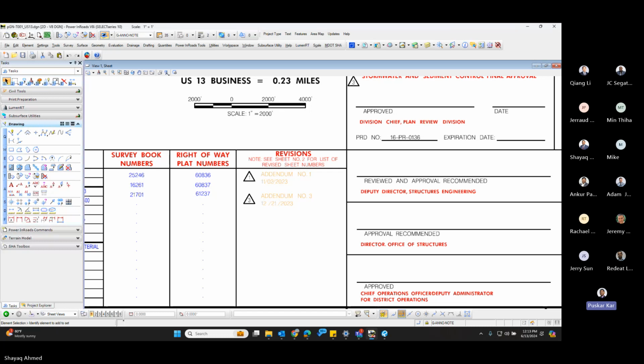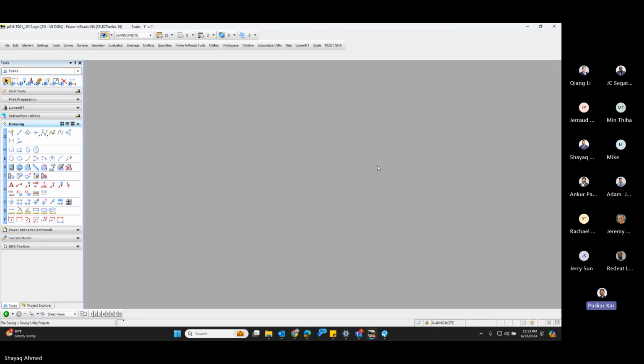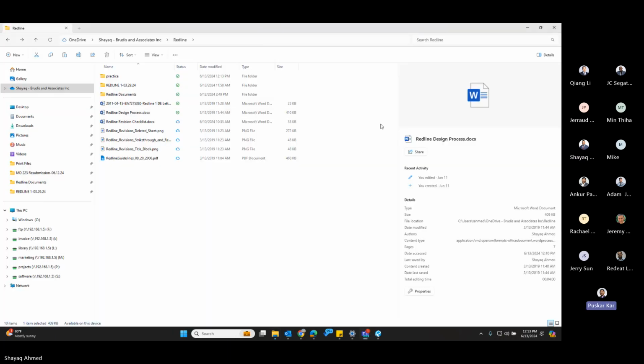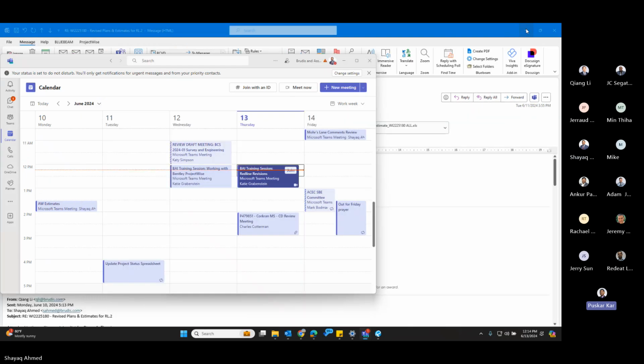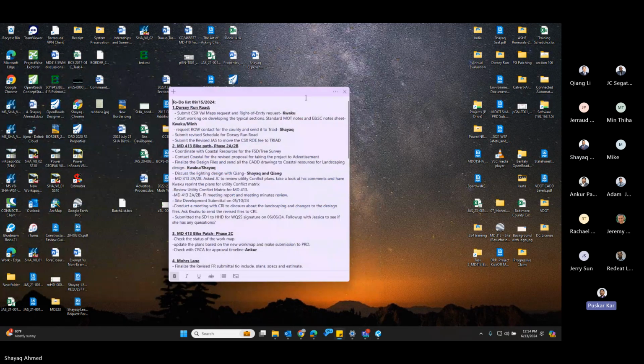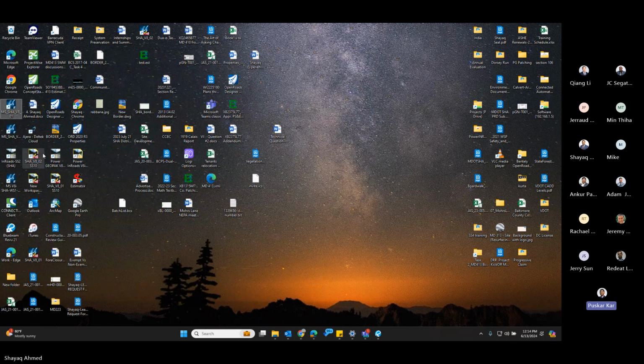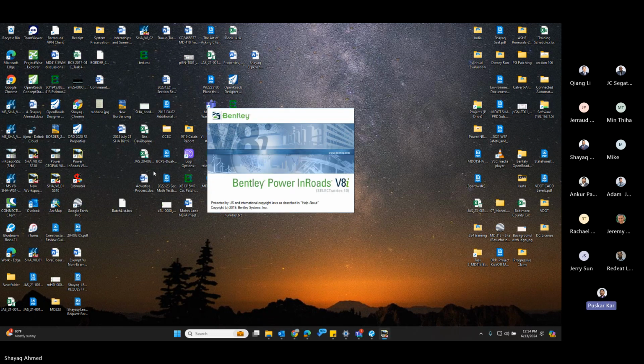Shek, if I may say something here to explain why we're archiving. Is that okay? Yeah, go ahead. So basically, when the project goes to advertisement, it becomes part of the contract document, because that is the part of the contract that State Highway signs with the contractor that will be constructing the project. So the original plans, cost estimate, the IFB, everything is part of the contract documents.